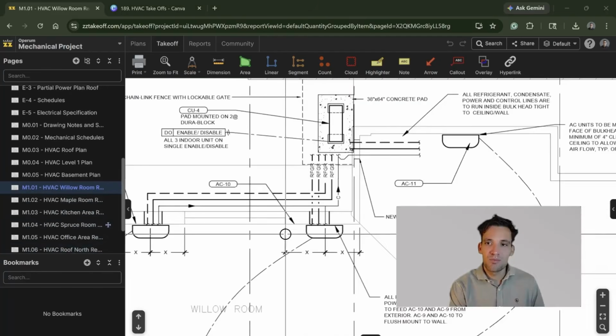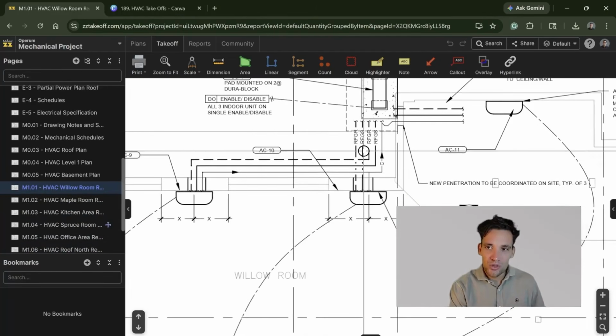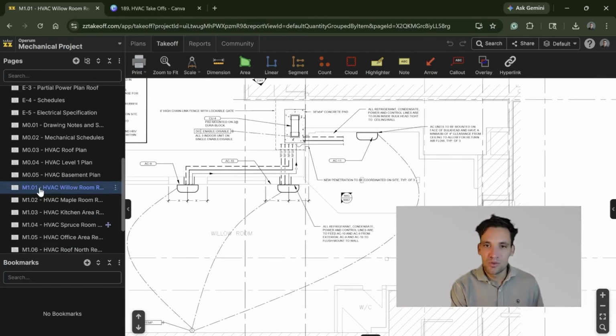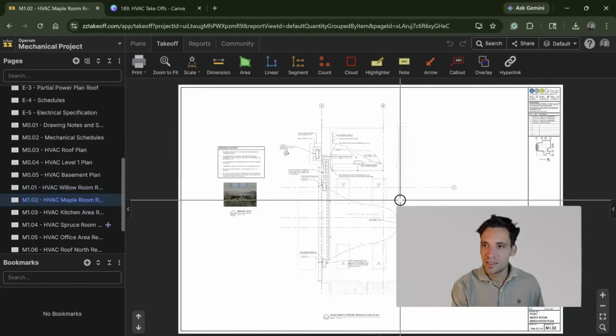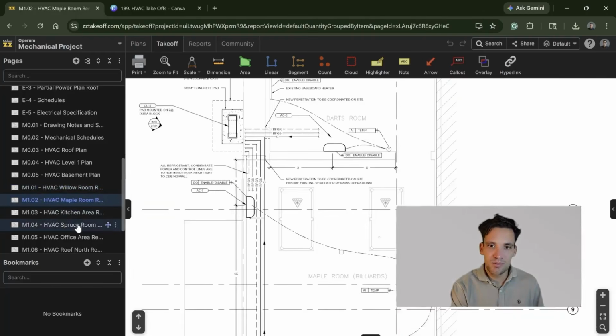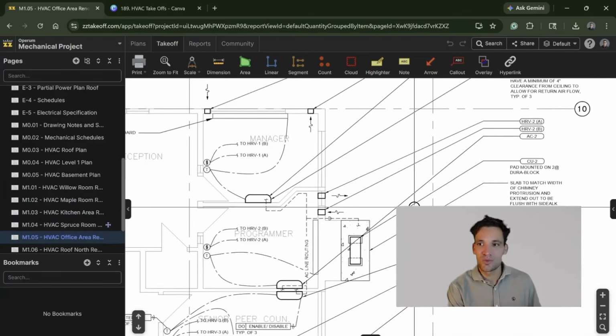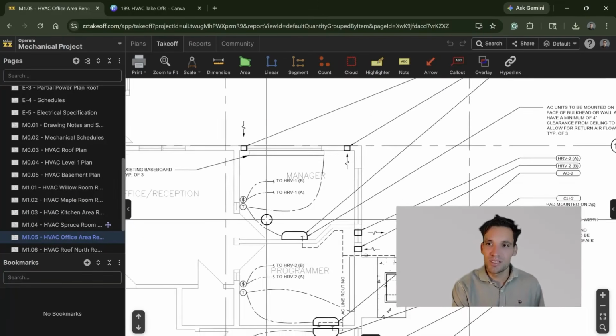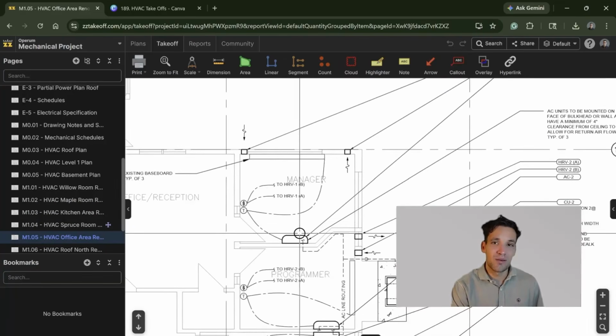So when we're talking about what to measure, most of these conduit, these small items where you'd have 3 or 4 meters per individual fitting. If we're talking about the actual BMS system and the cabling for that, again, you could just derive that rather than going and actually measuring out exactly how many meters of cable this is. You could just derive that from the number of units.